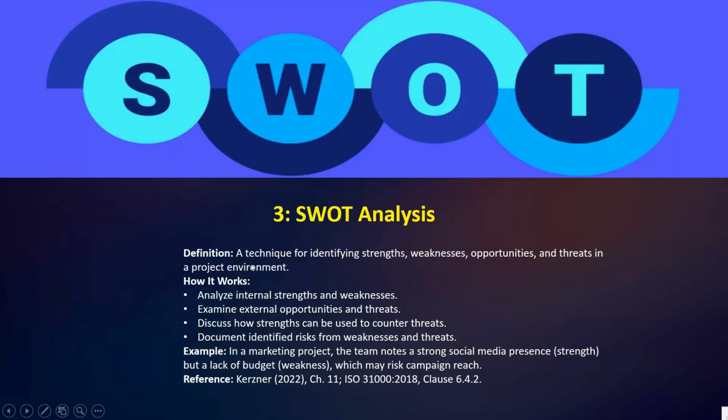So here you can see the definition: a technique for identifying strengths, weaknesses, opportunities, and threats in the project environment. Okay, so next we have how it works. Let's see how it works. Analyze internal strengths and weaknesses, then examine the external opportunities and threats, discuss how strengths can be used to counter threats, then document the identified risks from the weaknesses and threats.